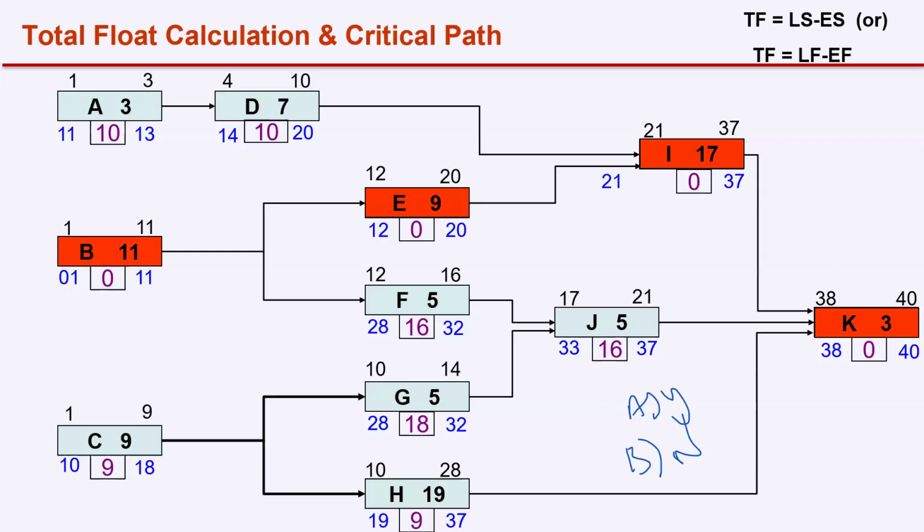For example, any of the non-critical path activities are delayed for more than its total float. For example, the total float of activity A is 10, and you delay it for 9 days. Total float of A becomes 1. It's not only for activity A, it will be for D too, it's a path float actually. I and K are not yet affected. Assume you delayed activity A for one more day. Total float becomes 0, D also becomes 0. So now we have two critical paths, ADIK and BEIK.